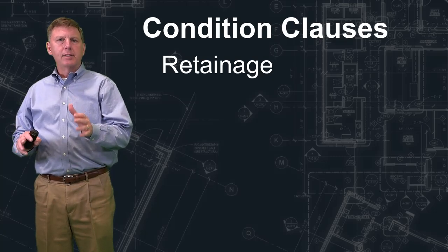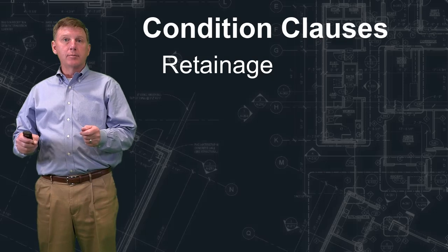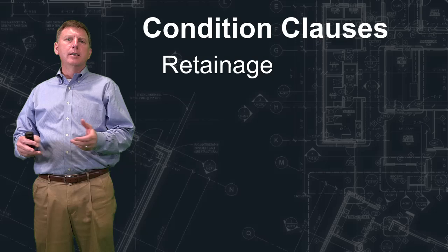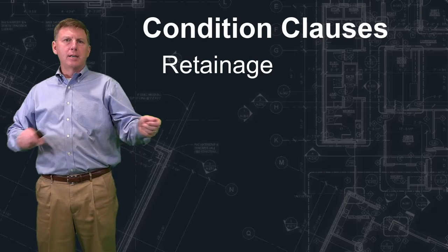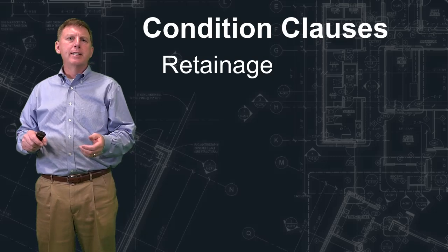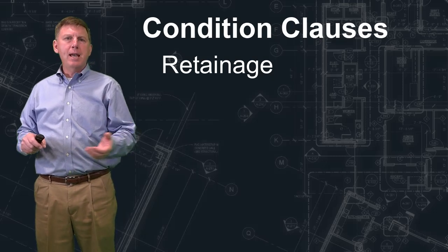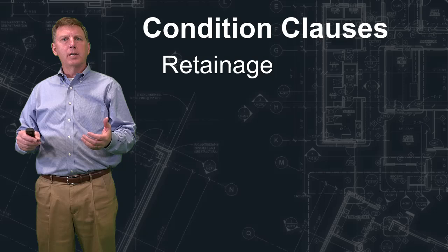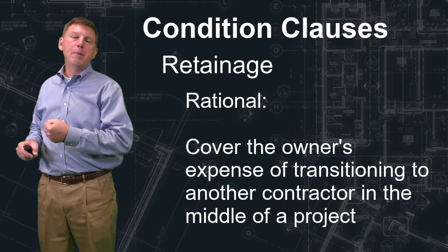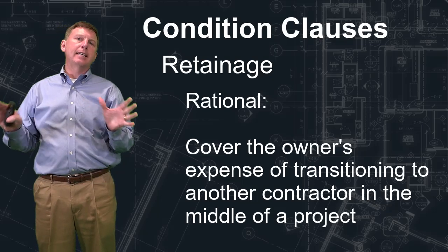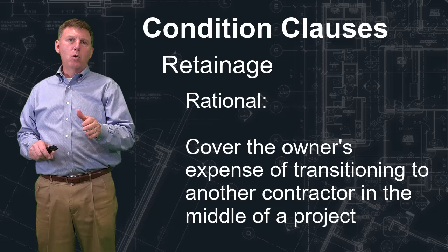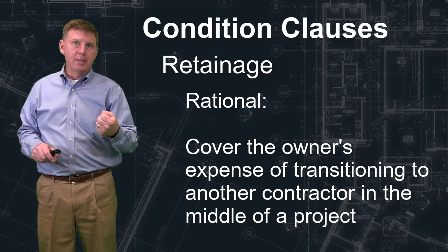If you think about it, you're working on a project. You complete so much of the project. You do the grading. You start doing some of the paving around the area. You're building, the foundations are going in. You reach a point where you submit a payment for all that work, and the owner says, all right, here's your payment, but I'm going to hold back 10% just in case something doesn't work out. So even though you've done the work, the owner's holding back some of that money.